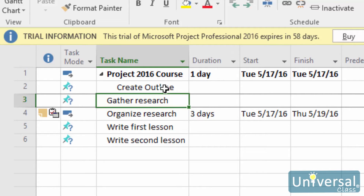Subtasks are tasks that are directly related to a parent task. If a parent task is to paint a wall, a subtask would be to tape before painting. We do not have subtasks yet. However, we are going to add a few subtasks for the research task in our project now.